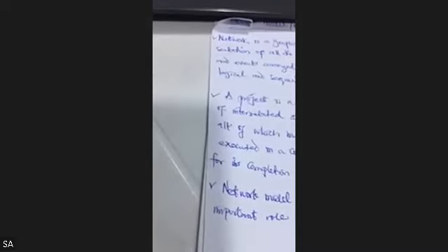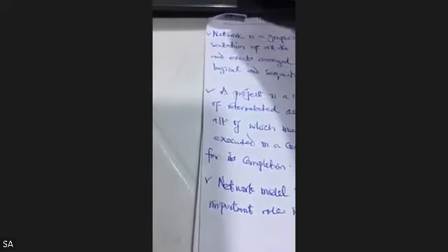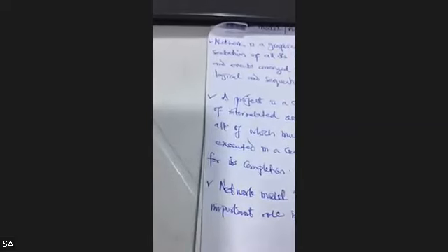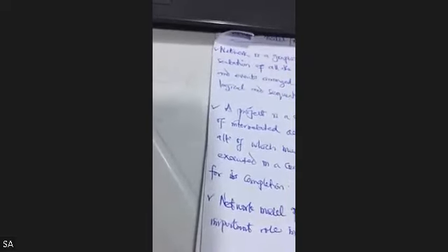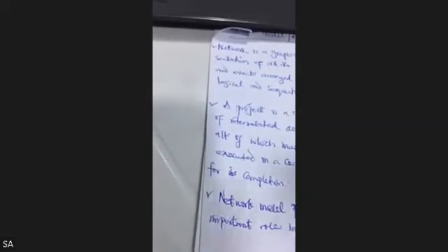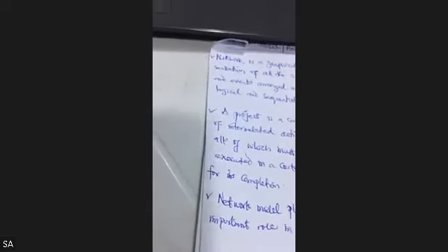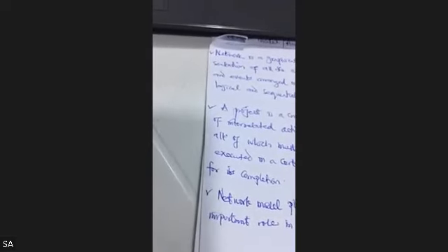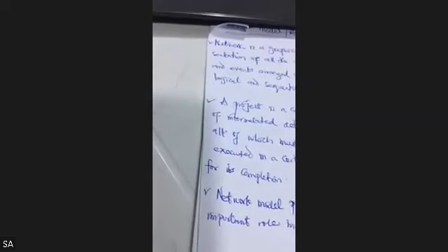concerning PERT and CPM. Now, also, let me quickly add this, very importantly. Understanding CPM means that first, you need to be able to define the project and then list out the significant activities or tasks to be carried out. So ask yourself, are these projects made up of different tasks, or what are the tasks involved in them? Should the project have only a single start activity, or a single finish activity? Ask yourself, how do we develop relationships among the activities? In that way, you need to decide which activities must precede and which activity must follow others.